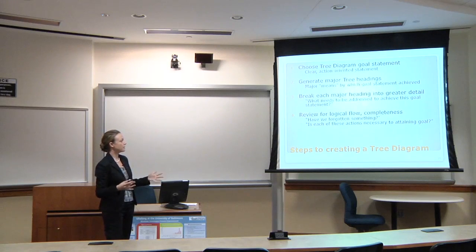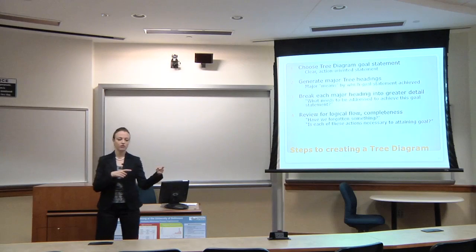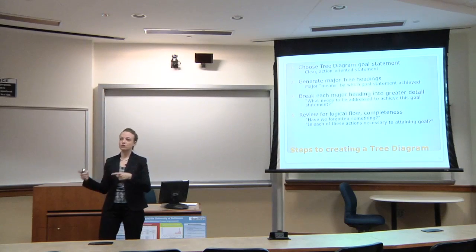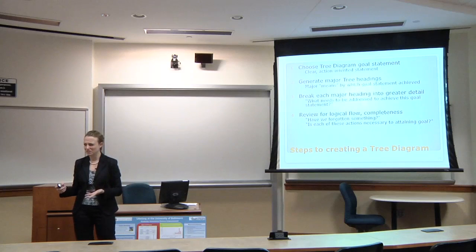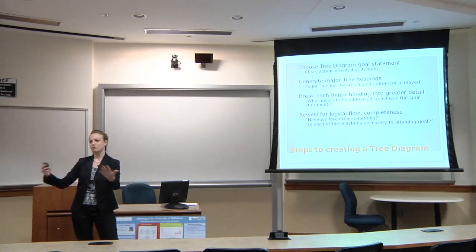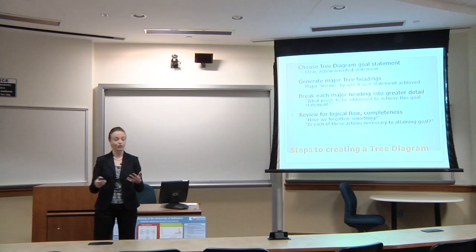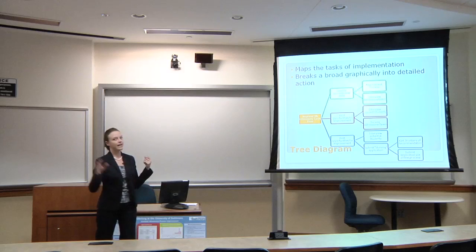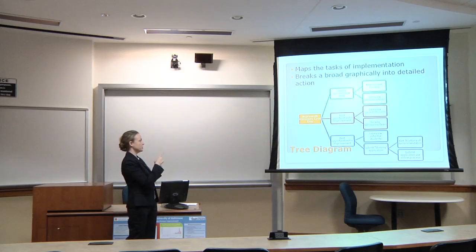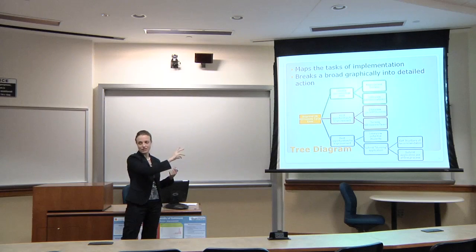Have we forgotten something? Is each of these actions necessary to attaining the goal? So there are 2 sides. One is, are we forgetting anything here? And two is, do we need to do this? Is this really necessary? You may look and say, you know what, we don't really need to interview the current admissions team. They're not the customer. The customer is the student. So we don't care about interviewing them, because we really want to focus on what the student wants and the student experience. It may be something different for you. But that's why we take the tasks and winnow them down into a tree diagram: putting it out in a visual display allows the entire team to take a look at it.